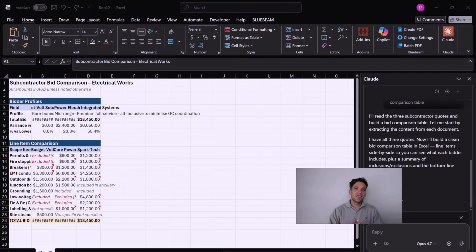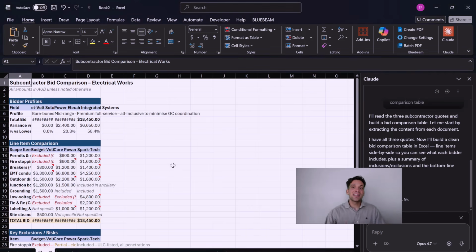So if we think about the quantity takeoff being the key driver of our cost to do the project, if it miscounts stuff, and again, that's also a bad task because we know AI is bad at reading drawings and visual reasoning. But if it stuffs up the quantity takeoff, our estimate is incorrect. That is very bad. On the other hand, we could use it for something like setting up our project folder and populating our project template.